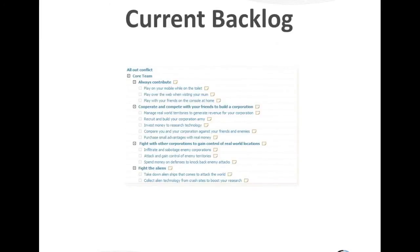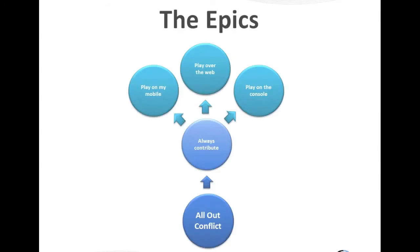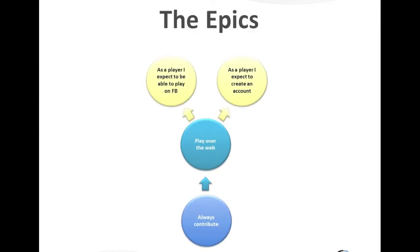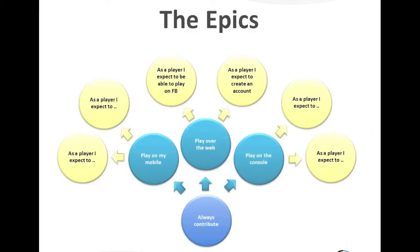Looking at the backlog, we can see how we're structuring it so that all the values are added in a hierarchical way. The next step is adding another layer using user story terminology — the epics. For 'play over the web,' we add two stories: as a player I expect to be able to play on Facebook, and as a player I expect to create an account. We do this for all the value support. What you can see is that we're building an onion from the inside out — adding layers but not going into depth first, just layer by layer.